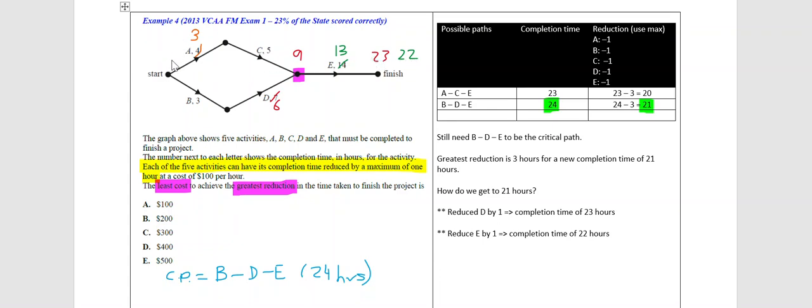Across the top I have 3 and 5, which is 8 to get to the vertex in purple, but around the bottom it's still 9, and we always take the highest number going forward. So I would still take the 9 plus the 13, which is still 22.